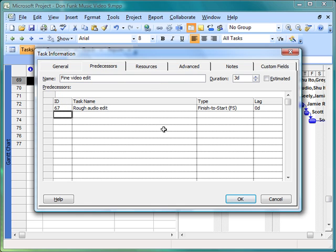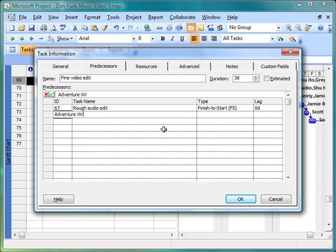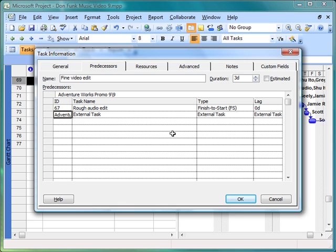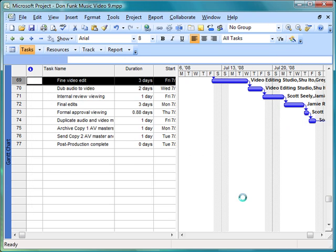I'm going to create a new predecessor or an additional predecessor for this task. I'm going to put it right below the existing task. And so I'm going to type in here the name of the file. It's Adventure Works Promo 9, and it is task 9. And I'll just press my tab key and I'm getting the external task that's showing up. I'll click OK.